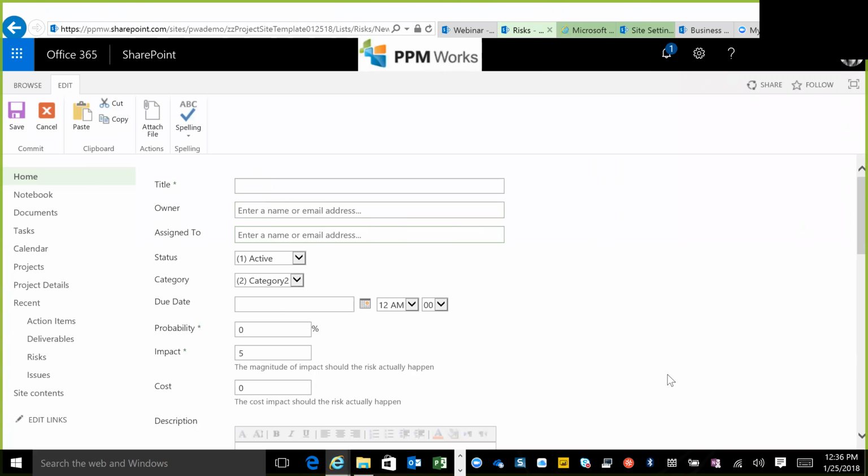We have a current risk register that we're tracking in an Excel spreadsheet, and we want to keep the same naming convention. I don't even recommend that you rename any of the fields on this page, and you certainly cannot delete those, because if you were to do that, you will break the site syncing. You actually will break the project site.